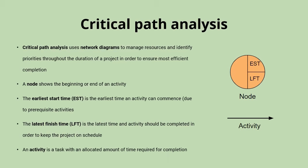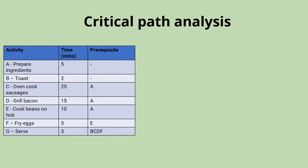The actual activities, or tasks to be completed in the project, are shown by an arrow with the duration needed to complete that activity written next to it. The easiest way to explain how these diagrams are put together is with an example. Here we have a list of activities to be completed — for a business this might be ordering supplies or constructing scaffolding, but we're going to draw up a network diagram for a simpler set of tasks.